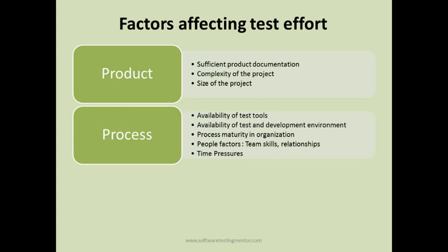Then the availability of test and development environments. If the development and test environments are already ready and up to date, it will require less test effort, rather than having to prepare the development and test environments before starting the testing, which will require more time. Then what is the maturity of the organization? If the process maturity in the organization is high, then the test effort required will be less, because the processes are already mature and you have to follow the specific processes to get the testing done.